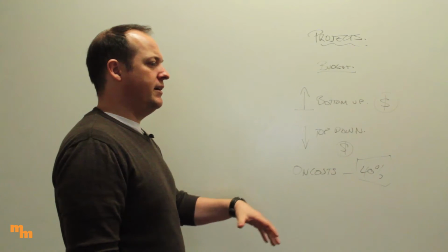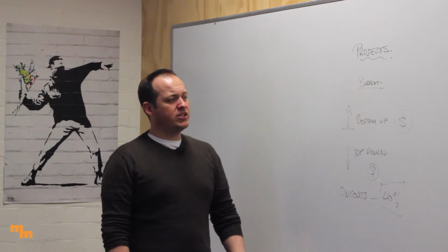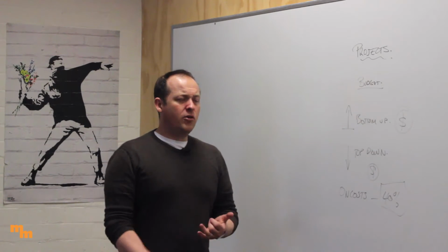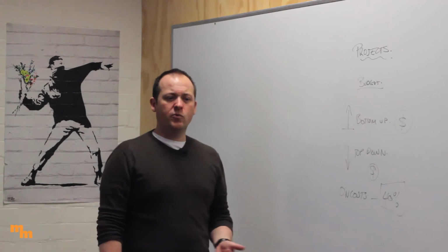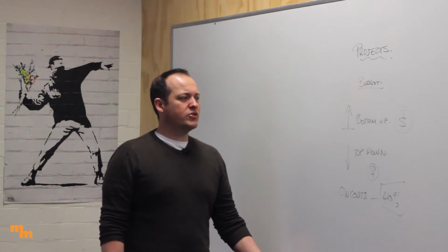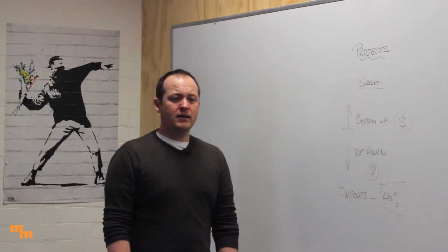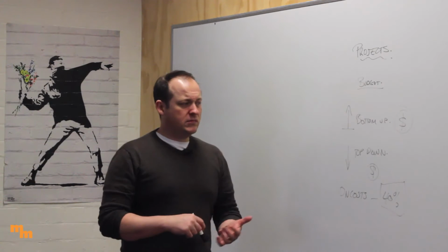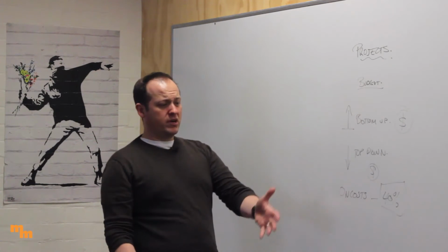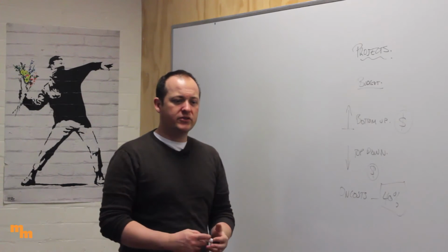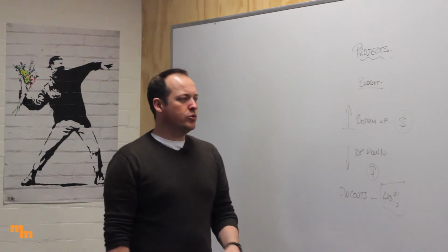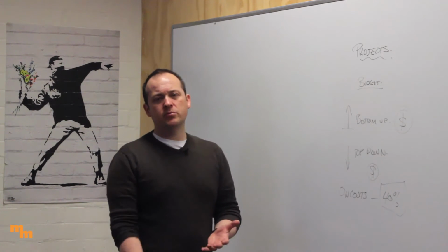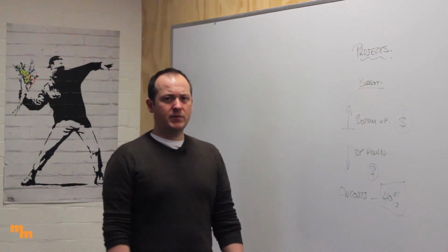So there's quite a lot in there. Things like the overheads to the organisation, when I'm working out those costs: the rent, any hire costs, the cost of electricity, running water, the administration. There's all those different costs that people forget. Cost of resources, I need to think about my materials. If I'm building something, it's wood, it's bricks, it's steel, all those raw components, and equipment. So machinery and tools, all those things that need to come in from somewhere. Either I have them, or I might need to hire them, or I might need to purchase them, okay? But these are all costs that are going to come into it.